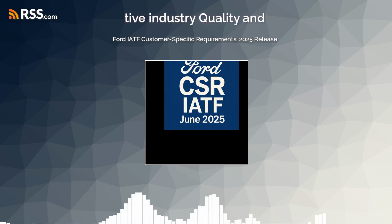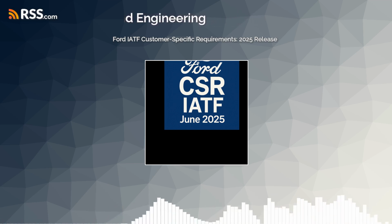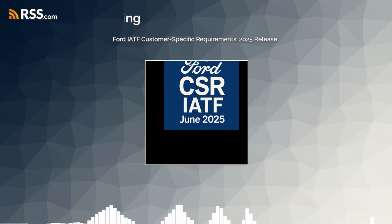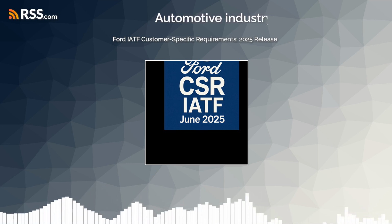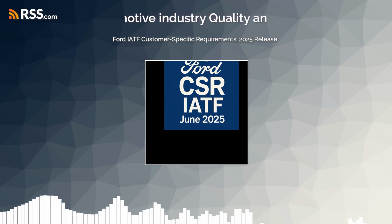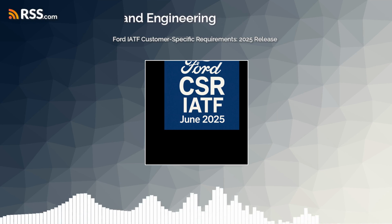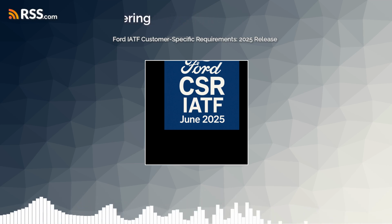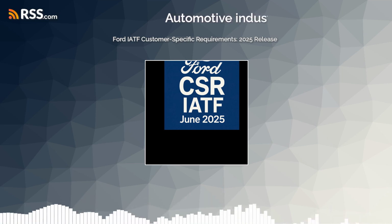Interesting. Okay, moving on to Section 8.2. Requirements for products and services. How do suppliers communicate changes they initiate after a part is approved? Say they find a better way to make it. That's handled through the SREA process, supplier request for engineering approval. This is the formal gateway required for organizations to propose and gain approval for process changes they want to make after the initial part approval. PPP. Okay, SREA for process changes.